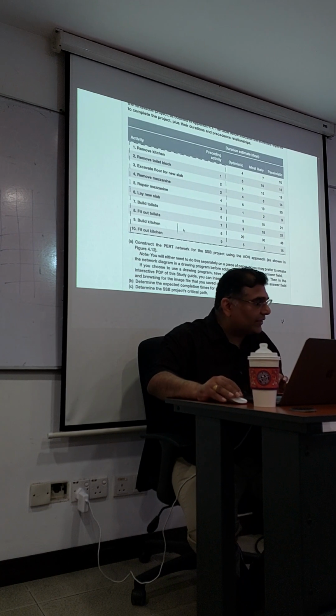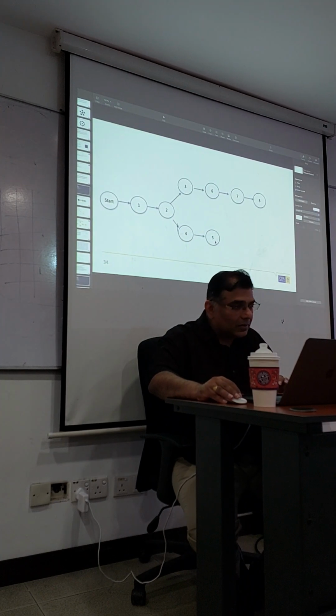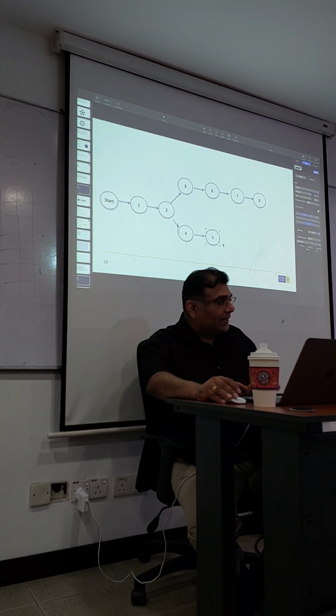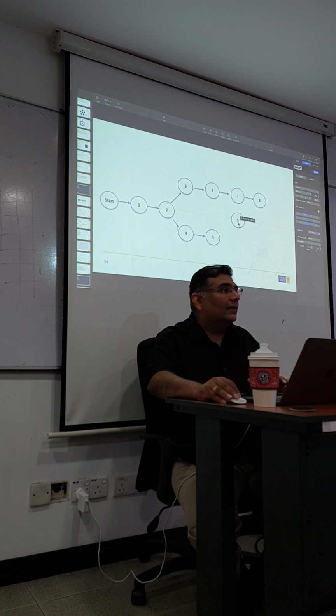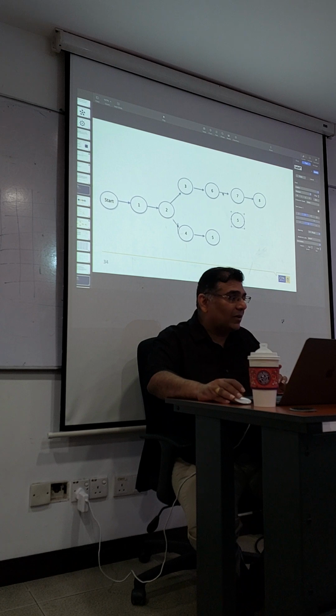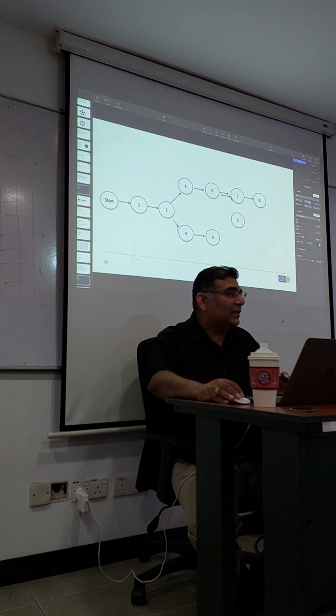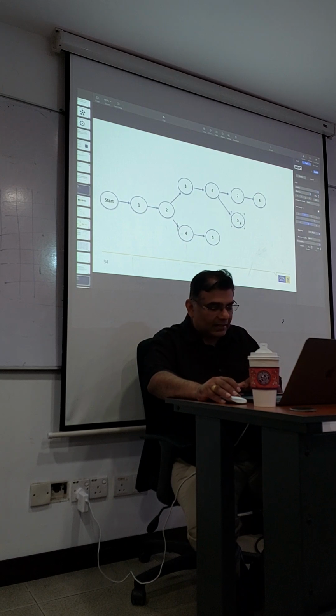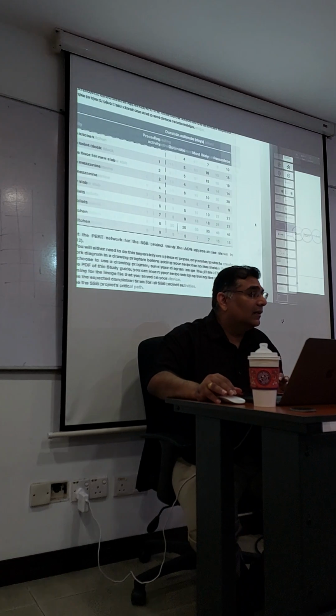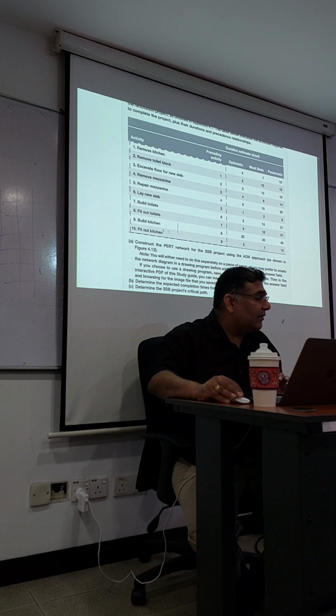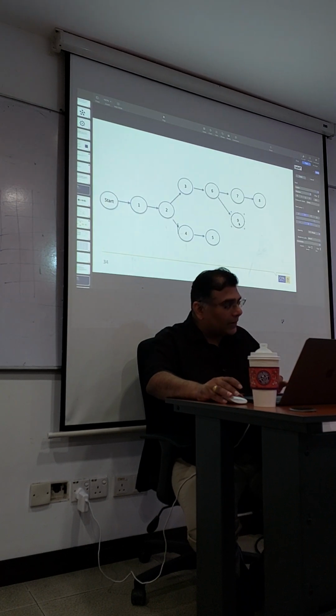Next. Activity 9 is after 6. So what do you have to do? 6 is splitting. Are you clear or not? Yes. This is the tricky part, right? Make sure you understand. I already told you this. I have never seen double, you have to split. This is activity 9. Activity 9 is after 6. Activity 10 is after 9. So I'm going to put another one here. It's going to be 10.